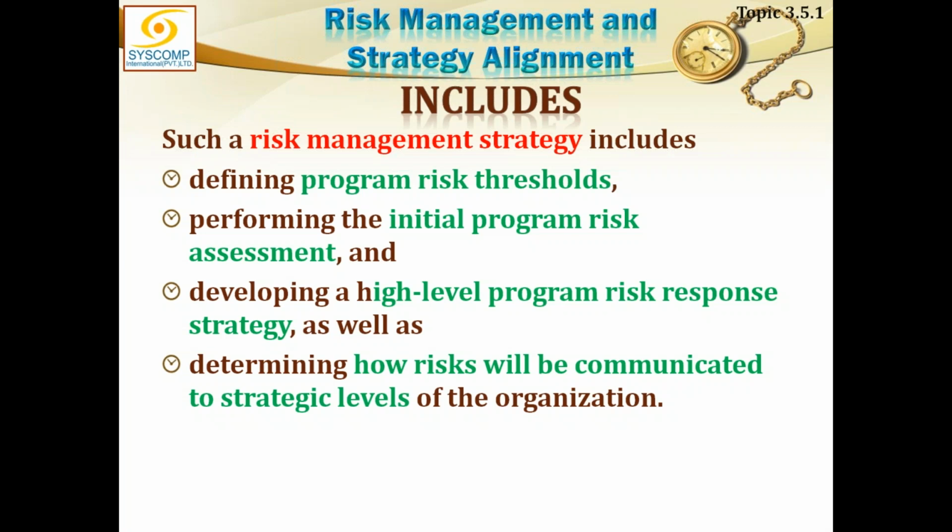So defining the risk threshold. What is risk from this program's perspective? How big is the risk? So you must understand the threshold, the limits which you can absorb. Anything within the threshold is considered acceptable risk, and any risk which falls beyond the upper level of the threshold would be an actual risk.